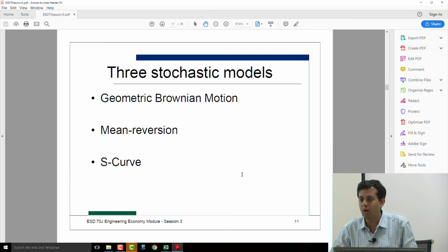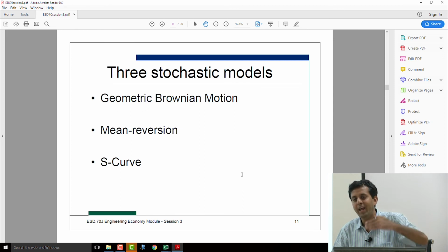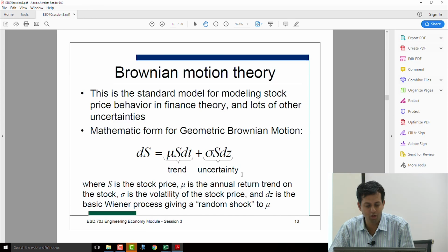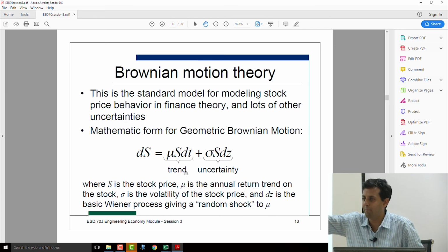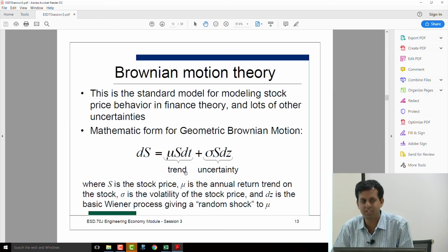you can look at demand progression. We looked at a very simple distribution like 50% whatever, but you can also have distributions that say next year's demand is last year's demand plus some variation. So you have formulae that come out of geometric Brownian motion. There's a little bit of a trend. I can see a 2% increase every year, but it's not a constant 2%. There's some uncertainty around that trend. So you can start putting in formulae that model demand in a more sophisticated manner.